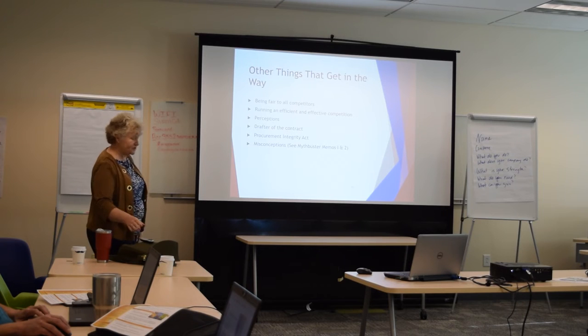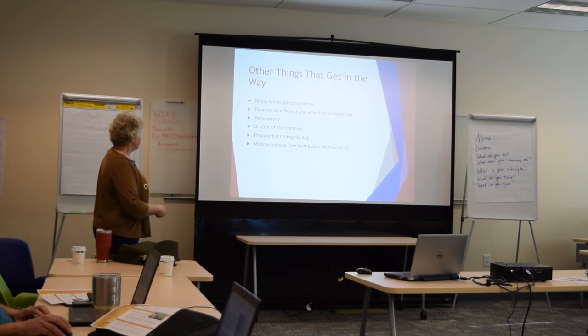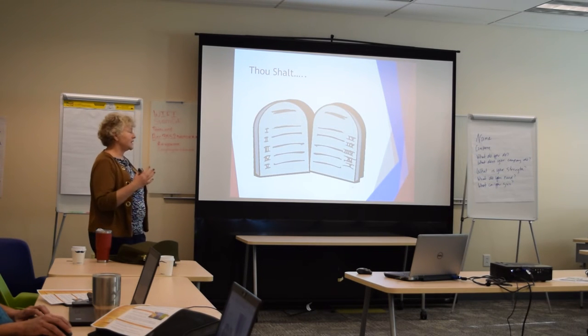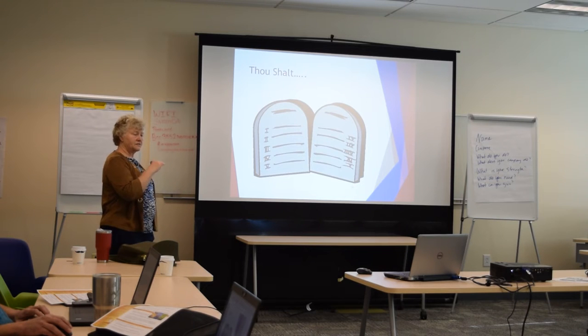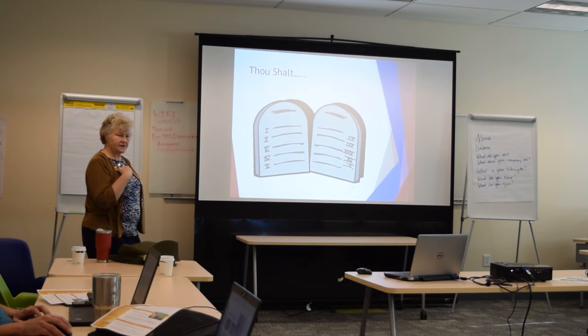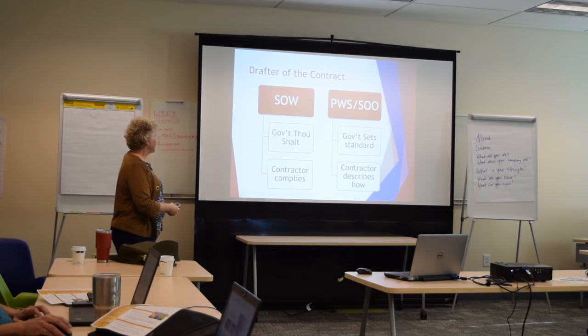We talked about perceptions. We talked about drafter of the contract and misconceptions. Those are the mythbusters memos we talked about. Okay, so remember we had the conversation about thou shalt, and have all the thou shalt do this, thou shalt do this. So when the requirements are written this way, the government is considered the drafter of the contract, and if there's any errors or omissions, it's the government's fault.